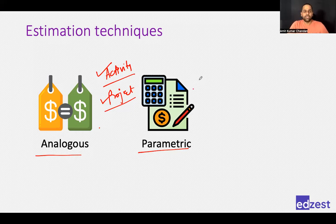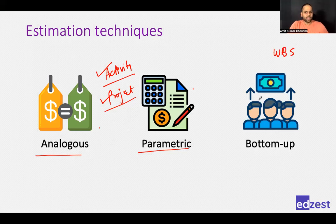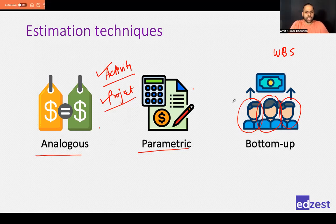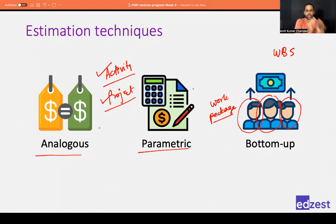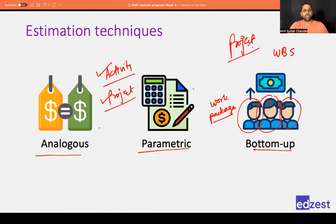The third type of estimation is bottom-up, where you go into the detail. You look at your WBS, go to the work package level, and individually estimate for every resource — not just people but also computers, laptops, suppliers, and every activity. When you estimate at the work package level, you add all those estimates together — work package one, two, three, four, five — and you get the complete project estimate.